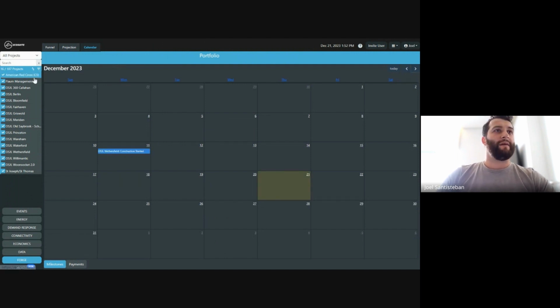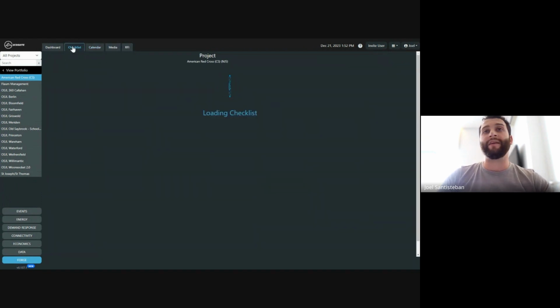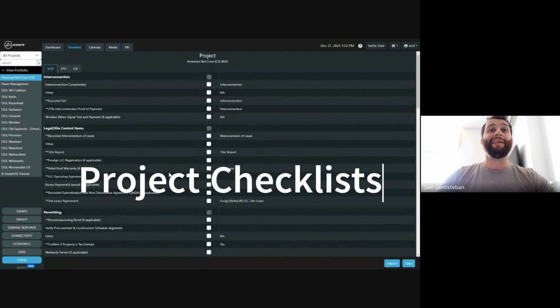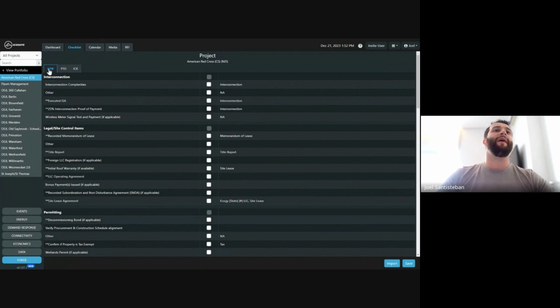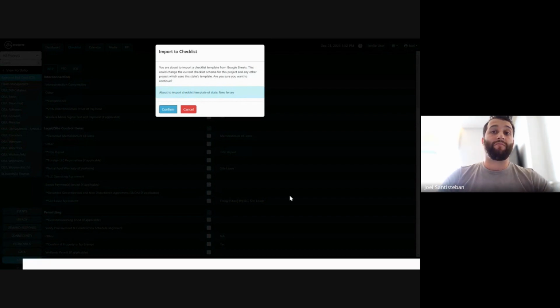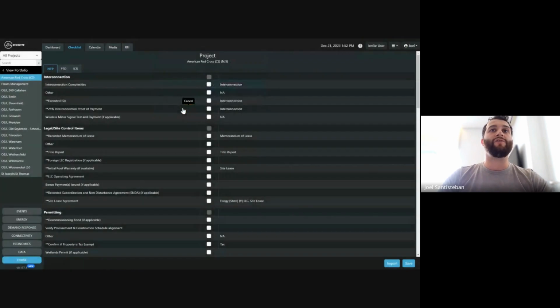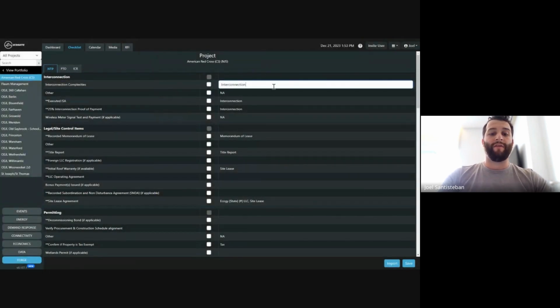It allows me to project out what's happening with projects and when. If I go ahead and click into a specific project, I'll also get a couple more tabs, and I'll just highlight here the checklist. This serves as a really functional diligence checklist as we head into very critical milestones, for example, NTP. These checklists are configurable. Like many of our other integrations, you can import a checklist and refine it to your needs. The template looks like this and can be created for various states, imported directly here into the Ecosuite and managed along with relevant notes.